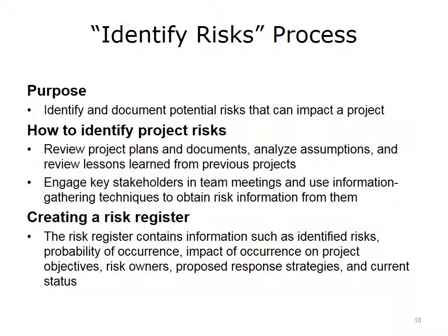First, you should gather and review all project information to determine the sources of risks and to identify those that may arise. These documents include the risk management plan, information about schedule, costs and quality, activity cost and timeline estimates, scope baseline, and the stakeholder register. Part of this information gathering process includes meeting with stakeholders to review risk information with them. They may be privy to information that you don't know and that they don't think is important, but which impacts the project. You may want to conduct focus groups or interviews to gather this information.